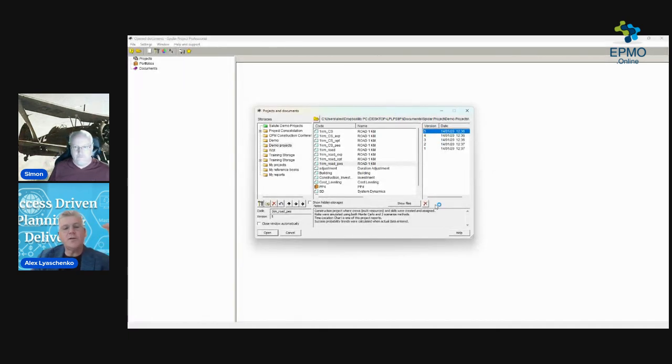But every time you provide actuals, collect actuals, the system automatically asks if you want to save it as a new version now. Okay. Yeah. Good. So that's an almost automatic process. So you could use that as your status state. Yes. You can do this, but the system also automatically does backups. That's something that was always difficult with Project Online. And you can configure how many automatic backups are done and how often. They automatically save in folders, and you can say, I want a backup every 10 minutes, and I want 10 rolling backups. So you can always go back.